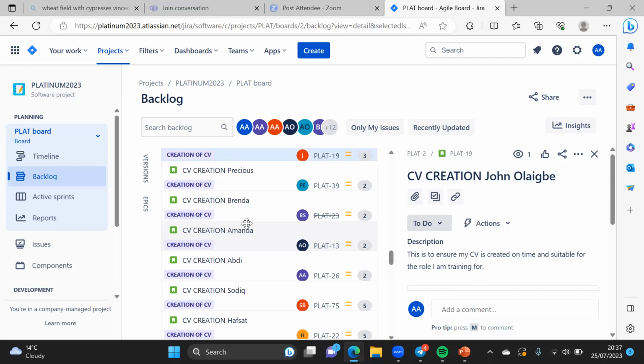All right, John. Hello. Akintunde has called a friend. Help him. Tell him how to create a story. Okay, I pray I remember clearly. So to create a story on the Jira board, we focus on the epics. From each epic, you can create a story under each epic. So if you can click on one of the epics, one of them is creation of CV.